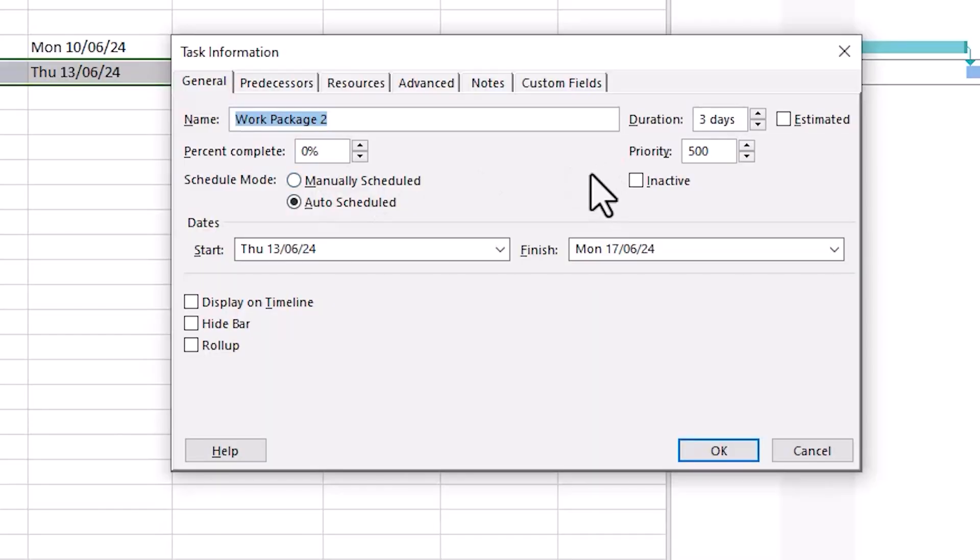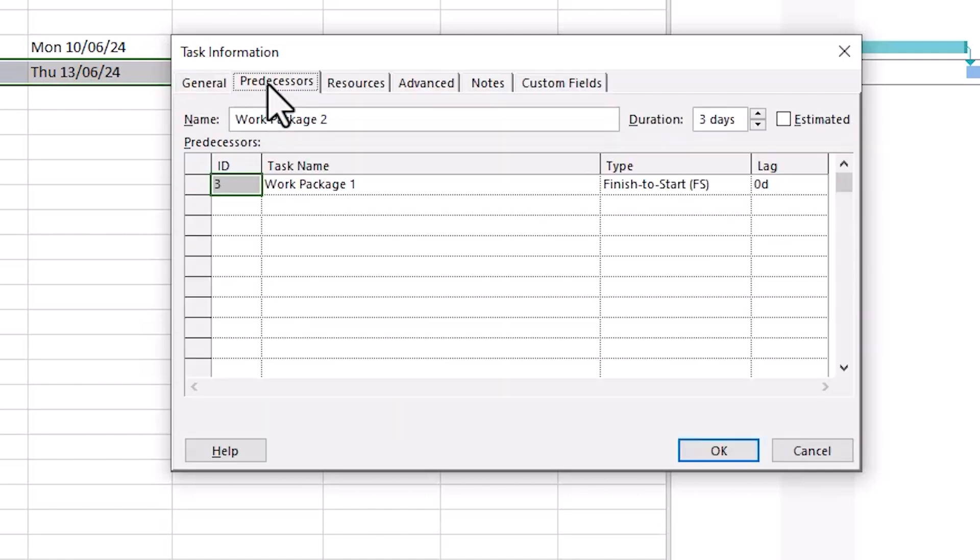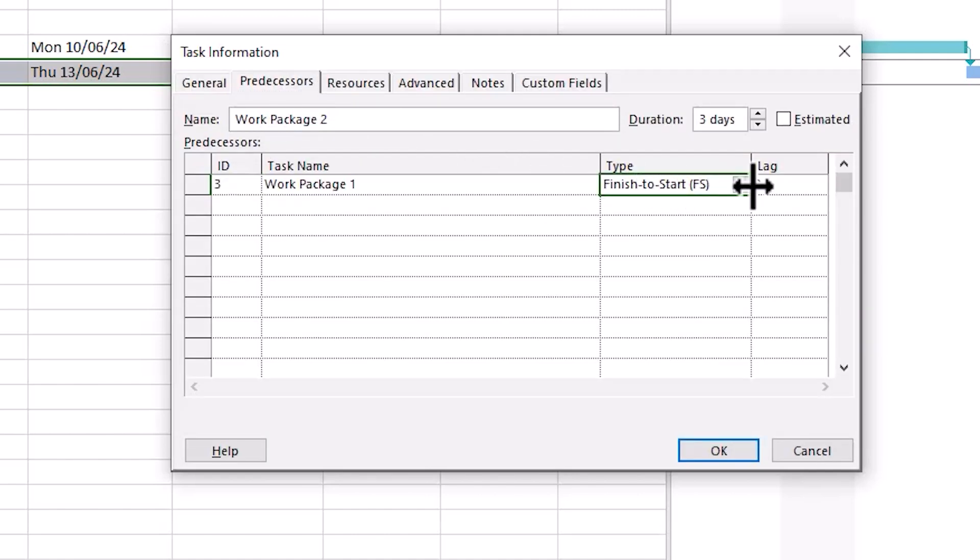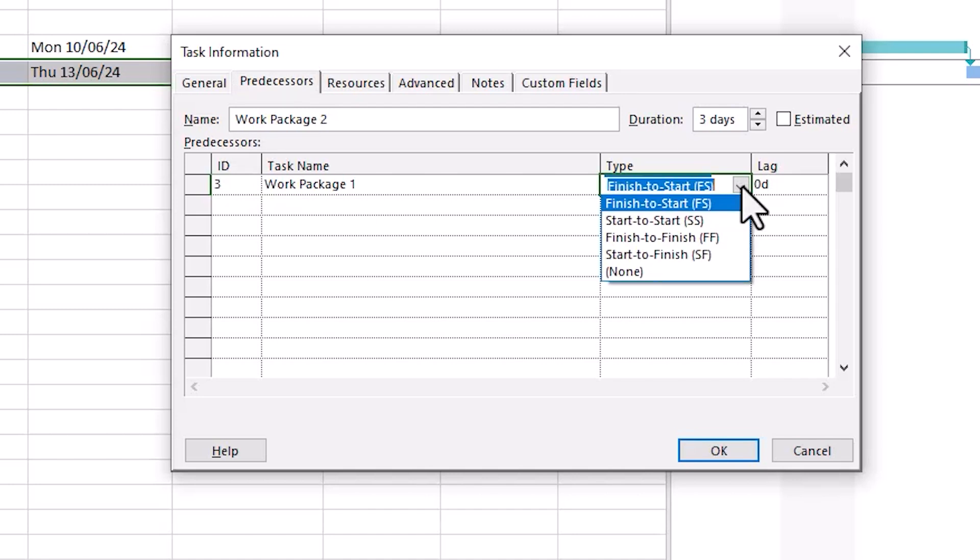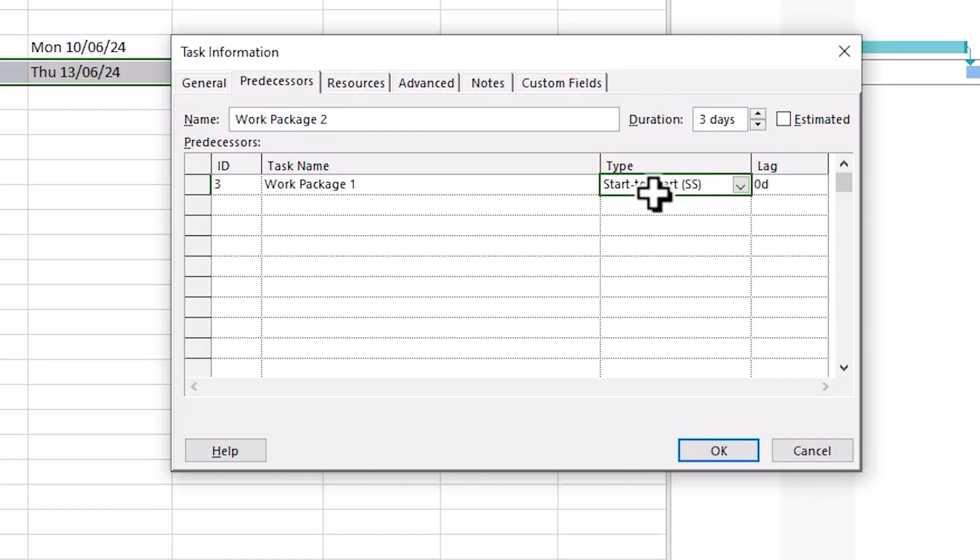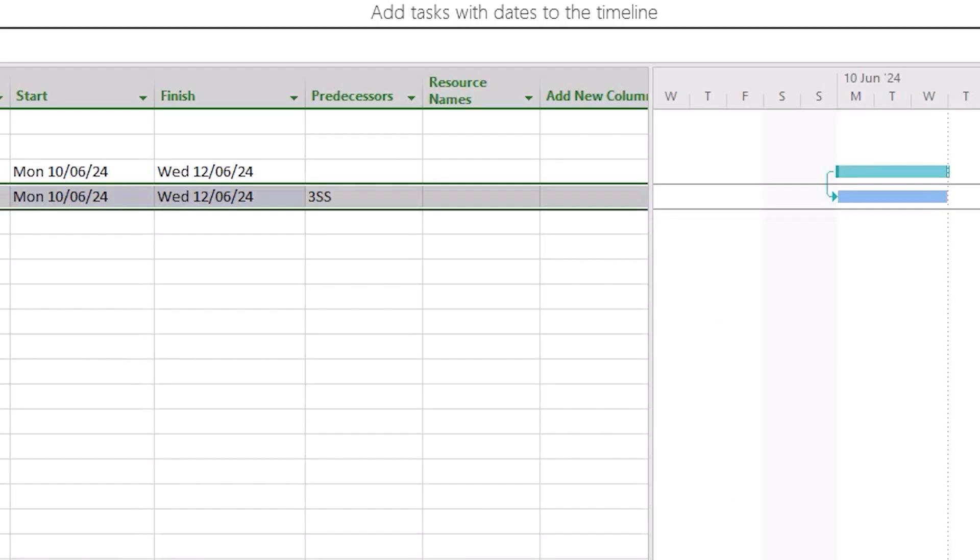For example, we can set a task to start at the same time as one of its predecessors, a linked task from earlier in the sequence. We open up task information, go to Predecessors. From the list of tasks available, we only have one option available here, Work Package 1. We go to the Type column and select Start to Start, press OK, and there you see the tasks now start on the same date.